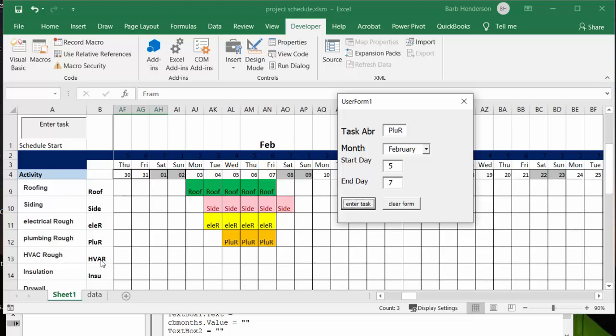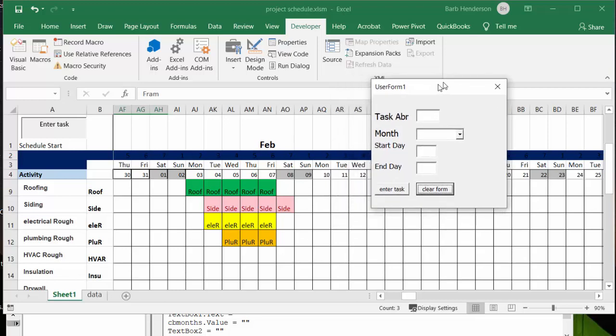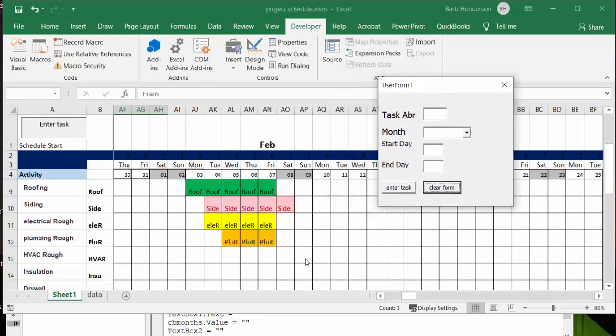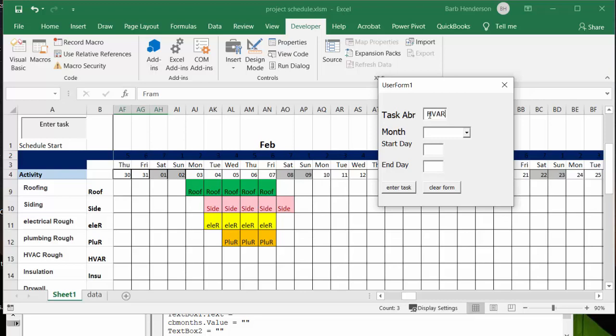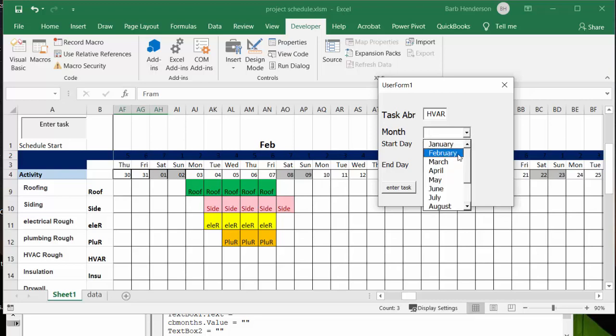So let's clear the form and let's have the heating and air conditioning start on February 10th, right, because that's after the electrical and the plumbing are in. So let's go for the 10th and so I'm going to go HVAR for roughed in, okay, and then I'm going to start it on the 10th on February 10th and I'm going to give them, I don't know, give them to the 13th.